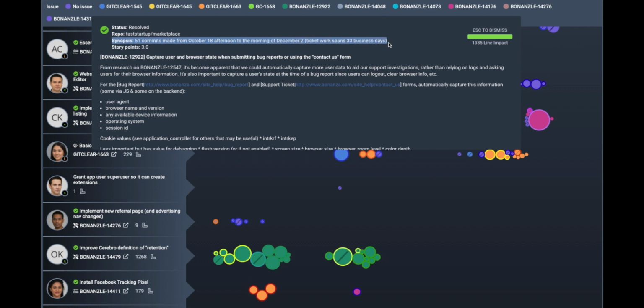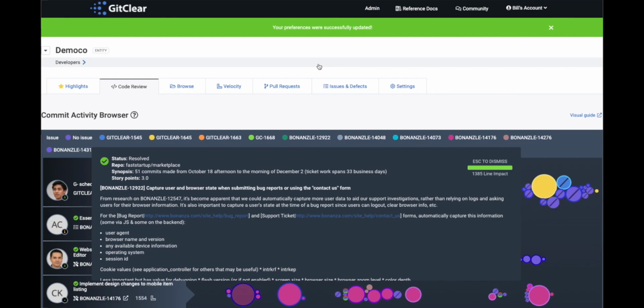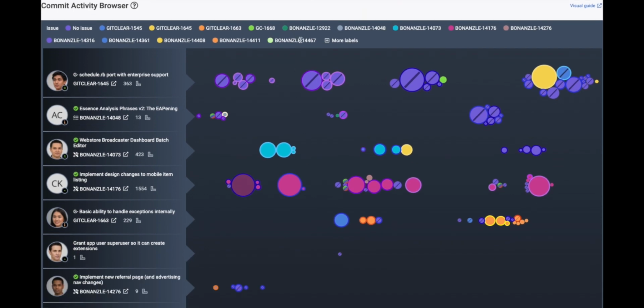When you find a ticket like this one, where the developer has been working on the ticket way longer than the estimate, a good first question to probe is what the developer has been working on lately, aside from this ticket, because in our research, it's not at all uncommon that 30 to 50% of a developer's time will be consumed by opportunities that weren't originally on the sprint schedule or in Jira.